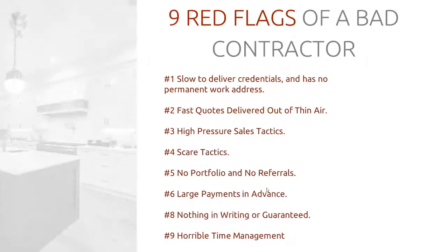And referrals: do they have a list of current referrals from all different job types that they've done? Could be five years ago, ten years ago, to last month. Ask for referrals. Also, large payments in advance. Anything that's usually over 10% or 5% or 3% is usually a red flag, depending on the contract. Don't give more than that.